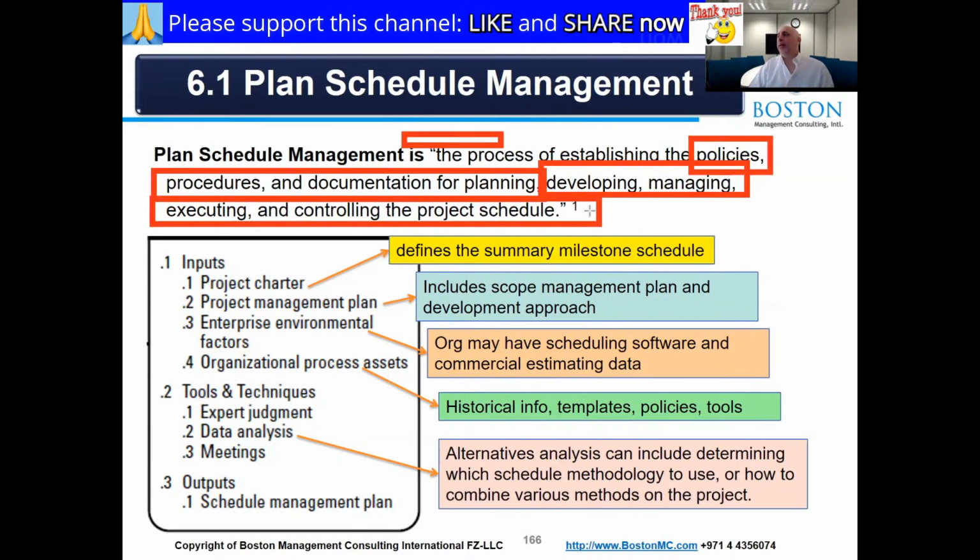All right, but Excel, unless you're doing a very, very small project, it's a bit tough to actually manage with, because Excel, yes, it can give you a list, you can put durations, but it's really hard to build in dynamic changes. So if one activity gets extended, I cannot see the impact on the rest unless I manually go change them, or unless I want to build in macros or something.